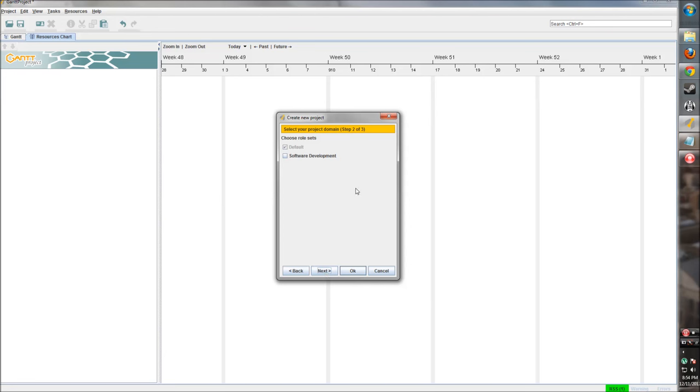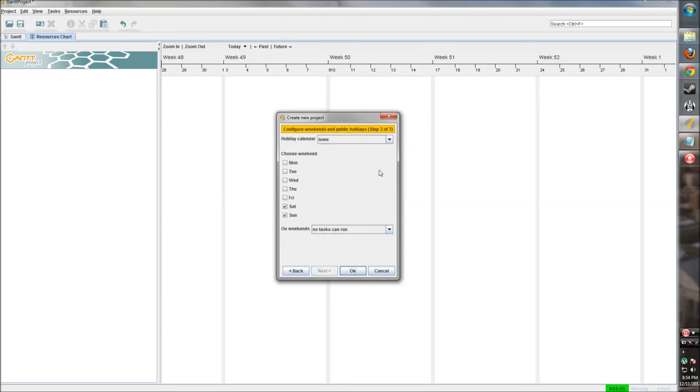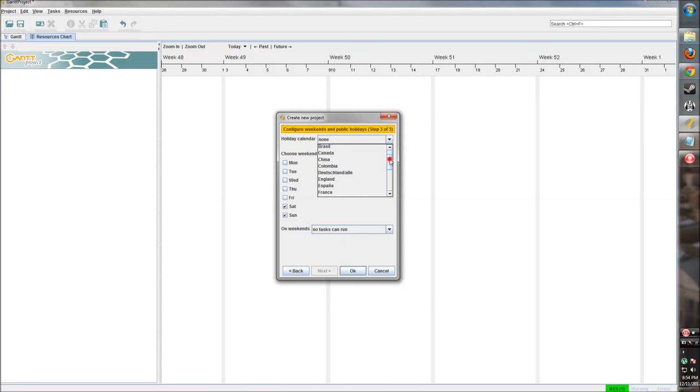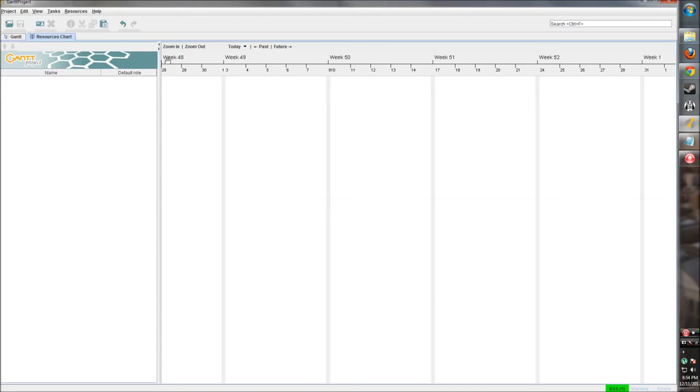Now, before when we were creating Bob, we saw that his roles were rather limited. It was undefined or project manager. So here, if we click on software development, we get a little more granularity in terms of what people are doing. And it includes developer, doc writer, tester. We can set resources to these new values, which is pretty helpful. So you can set a holiday calendar. So tasks won't be worked on on certain days. Where's the United States? There it is. And choose the weekend days. So Saturday and Sunday are the default weekend days. And on weekends, we want everybody's office so that no tasks can be run those days.